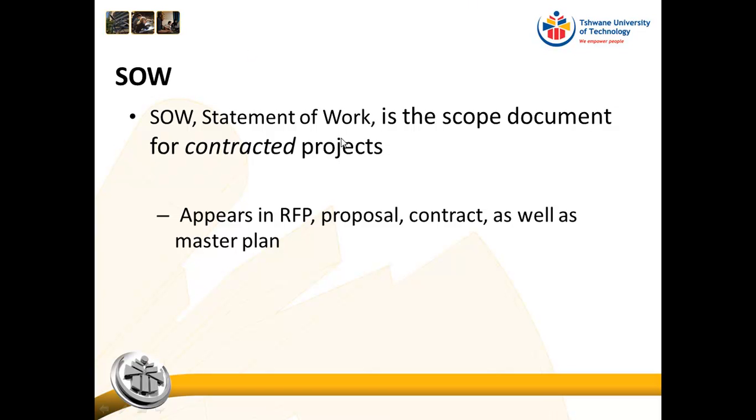What will happen is that there will be a request for proposal or a contract or a master plan which is given to you by the client, and so for a contracted project, that statement of work is already included in those documents.